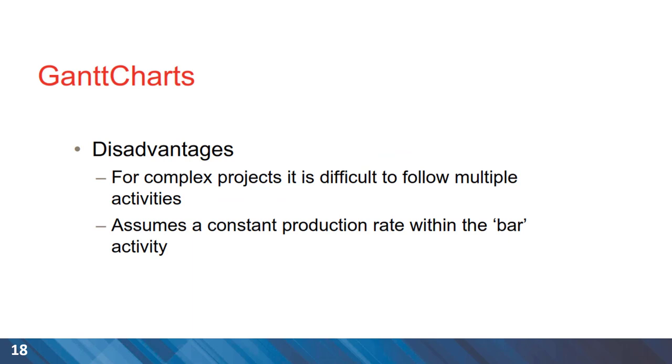On the downside, there are a couple of disadvantages for complex projects. It is difficult to develop the Gantt charts and they become pages and pages of documentation and graphs. Assumption we make for Gantt charts is that the production rate and the number of resources we require for different activities during the life of the activities of a project are constant.